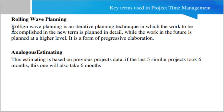Another term is Rolling Wave Planning. Rolling wave planning is an iterative planning technique in which the work to be accomplished in the near term is planned in detail, while the work in the future is planned at a higher level. It is a form of progressive elaboration.